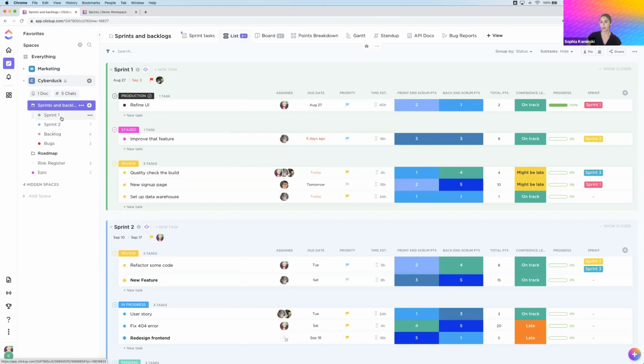The nice thing about this is you can actually set up a planned start and end date for a sprint that would appear in a calendar view or a Gantt view. And then you can indicate specific tasks within your sprint list and set deadlines for them within those planned start and end dates you've set for your sprint lists. ClickUp also incorporates various task views, so you can see all of your sprint tasks and lists in different ways.